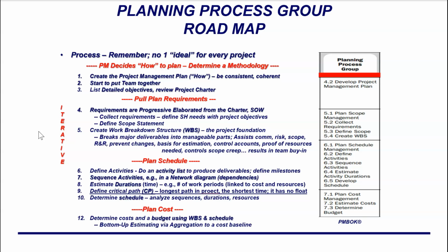So we want to estimate how long each activity will take, all right, how many time periods, and that then is going to help us define the critical path along the schedule, which will then give us a final schedule, which becomes the schedule baseline.